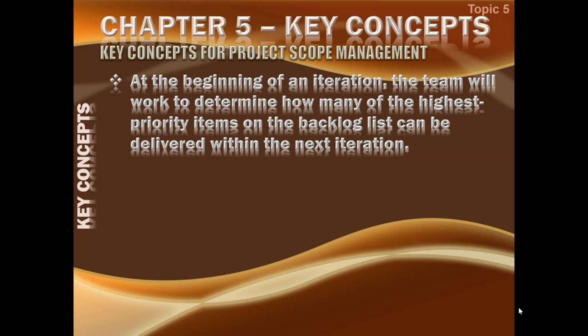So your customer has just told you that they want to have a kind of inventory system to be developed, and they will keep telling you the requirements over time. So the basic requirements they have provided, and based on that you have given them an approximate time frame, which is not binding at all. So now you are asking them to give you the user stories. You discuss with them and you keep getting their user stories, keep stacking them, and you keep picking tasks for each iteration and keep doing it. You only plan in detail for one iteration at a time.